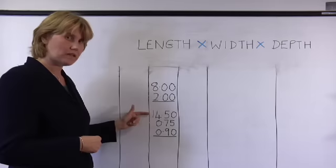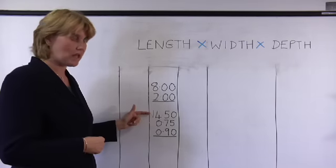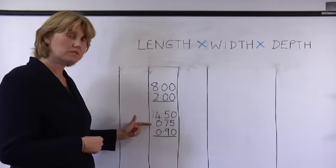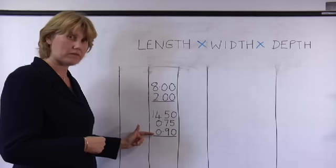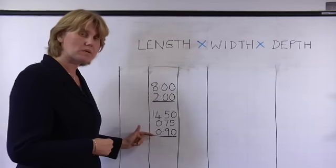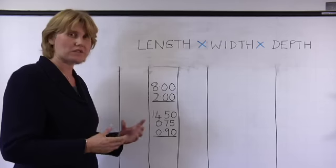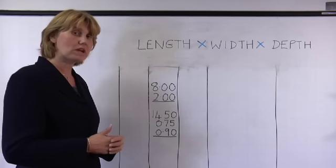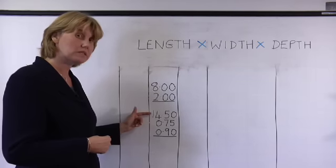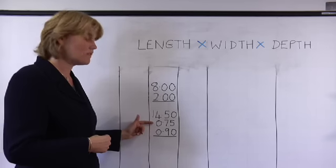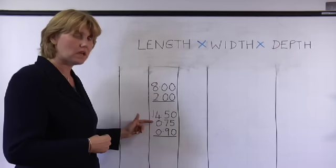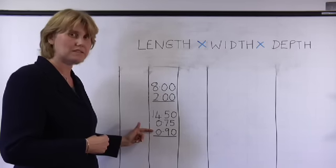Our second example is a cubic measurement. Here we have the length times the width times the depth. If we imagine the physical quantity that this represents, say excavation of a trench, we have a trench which is 14.5 metres in length, 715 millimetres wide, and 900 millimetres deep.